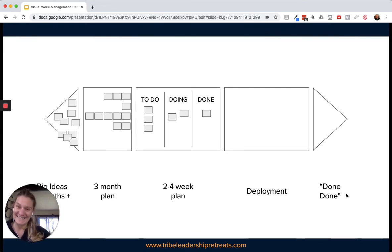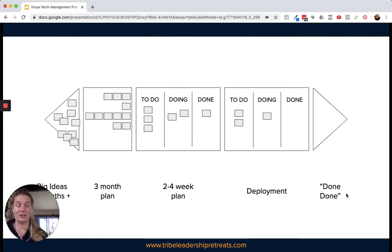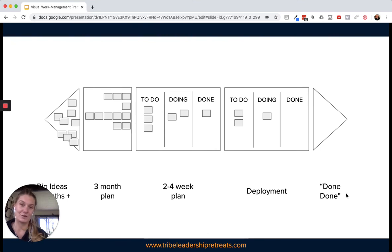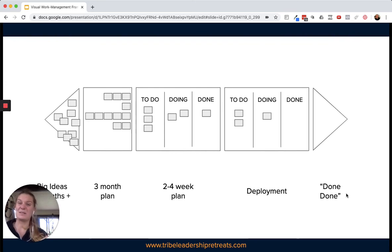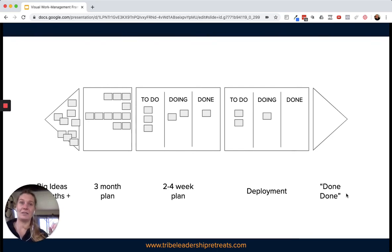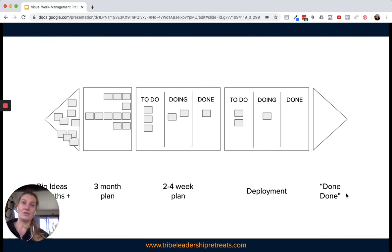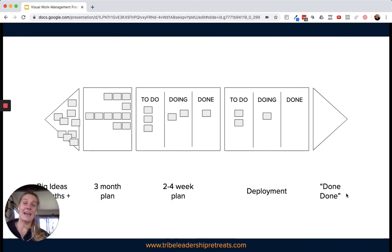Ideally once you're done, you're done. However, this team, because we had such a complicated and really long lead time on the deployment process, the deployment timelines were sort of another three months on their own sometimes just to get stuff in. This team actually built the same wall as what they had with their two- to four-week plan, but specifically around the deployment of work. Once something was done by the team, they moved it into a to-do column for the deployment team to pick up and manage through the operations process. In that way we could continue that visibility, not simply chucking it over the fence to operations, but actually follow it all the way through until it was done out in the wild serving our customers.